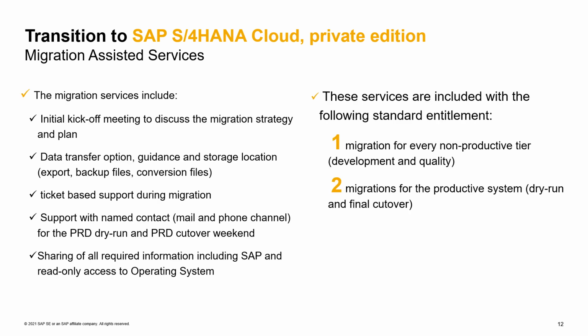Let's now have a look at what migration services are included. There will be an initial kickoff meeting to discuss the migration strategy and go through the plan. You will receive guidance for data transfer and information about the storage location for storing the export, backup files, and the conversion files, ticket-based support during the migration, support with a named contact during the production dry run and cutover weekend, and also all the required information that will be shared, including SAP users and read-only operating system level access.